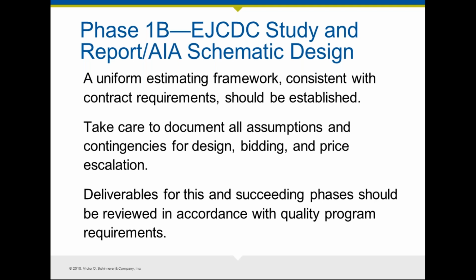You're documenting all your assumptions and contingencies, and your deliverables at the end of this phase should be reviewed in accordance with quality program requirements that you may have. You should also make sure that the owner has reviewed and agrees to your proposed design solution before you move on.